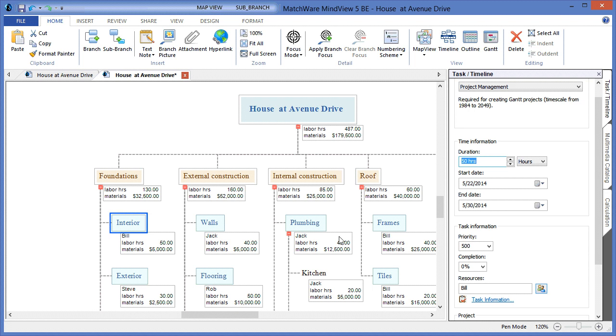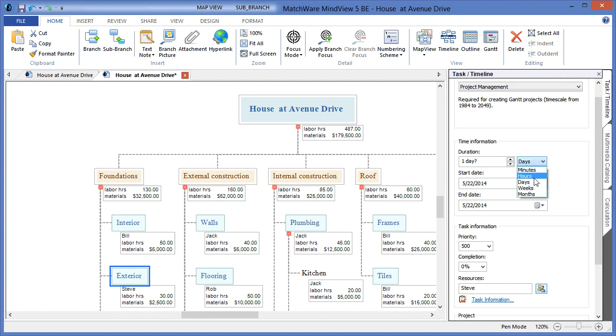I can continue with Steve's exterior task. By selecting the exterior item, I can choose to change the metric back to hours, and choose to update that information based on the estimation, in this case, 30 hours. I will continue to move forward and enter the items, durations, and start dates into the WBS.